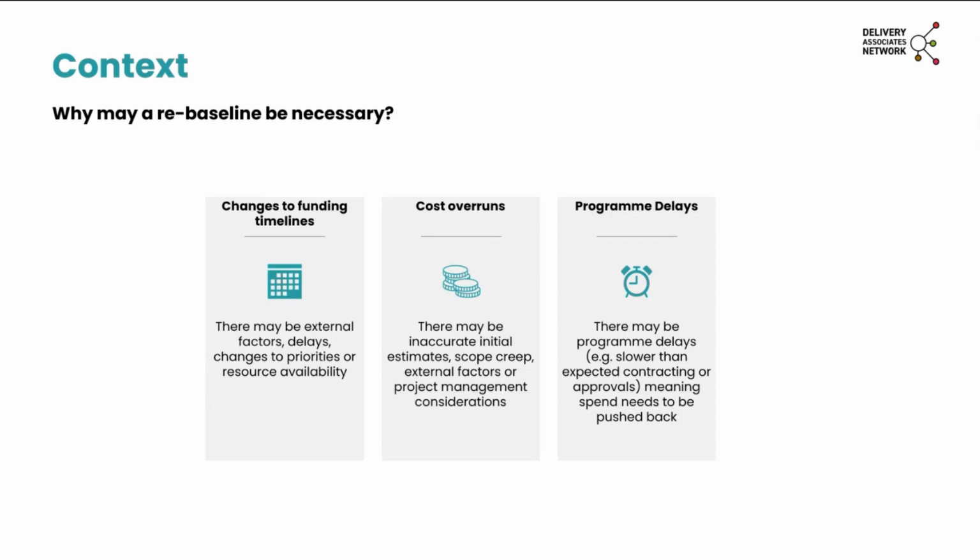A budget rebaseline may be necessary due to three key reasons. One, changes to funding timelines. Two, cost overruns. And three, programme delays.